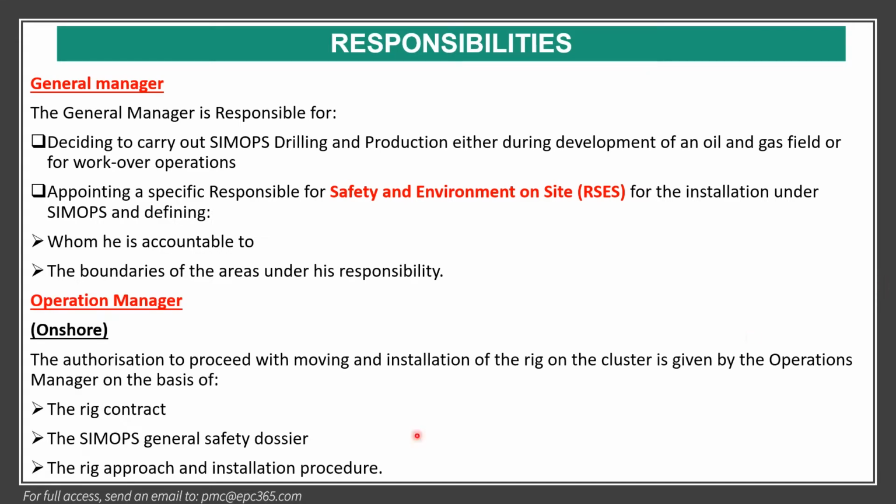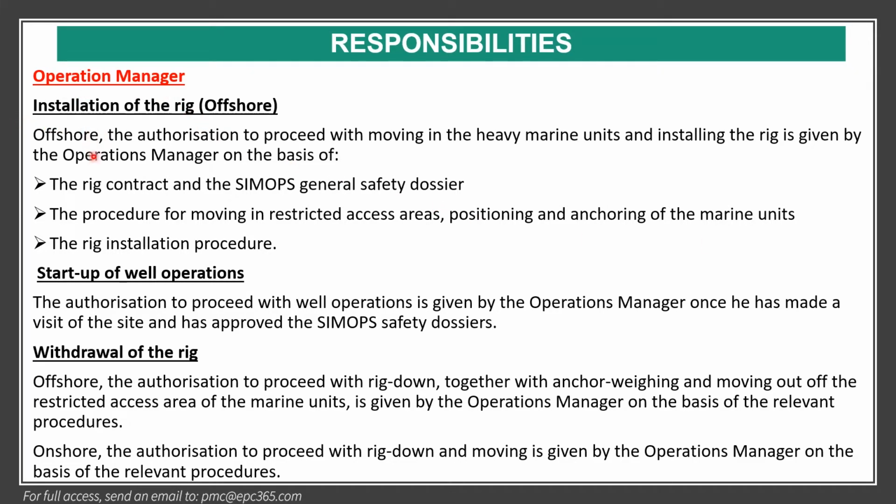For the operation manager, normally for offshore, authorization to proceed with the moving or installation of the rig on the cluster is given by the operation manager on the basis of the rig contract, SIMOPS general safety dossier, rig approach, and installation procedure. The same goes for startup of the well operation and withdrawal of the rig. So these responsibilities should be clearly defined for the SIMOPS dossier.